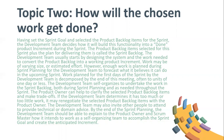Work planned for the first days of the sprint by the development team is decomposed by the end of this meeting, often to units of one day or less. The development team self-organizes to understand the work in the sprint backlog both during sprint planning and as needed throughout the sprint. The product owner can help to clarify the selected product backlog items and make trade-offs. If the development team determines it has too much or too little work, it may renegotiate the selected product backlog items with the product owner. The development team may also invite other people to attend to provide technical or domain advice. By the end of sprint planning, the development team should be able to explain to the product owner and Scrum Master how it intends to work as a self-organizing team to accomplish the sprint goal and create the anticipated increment.